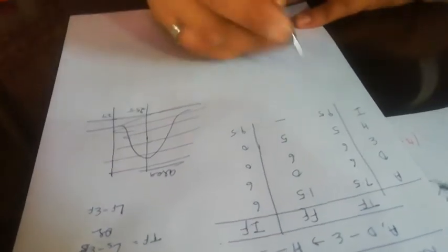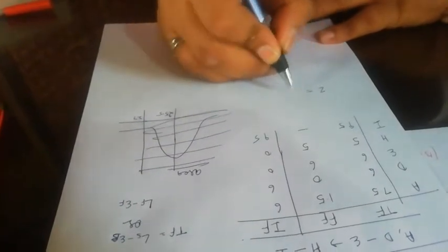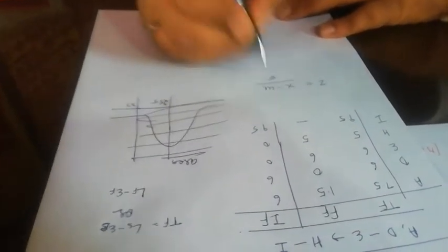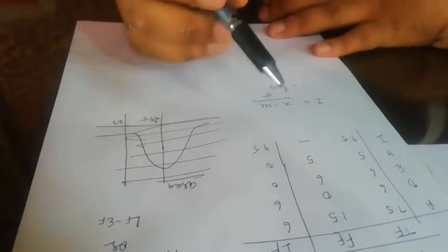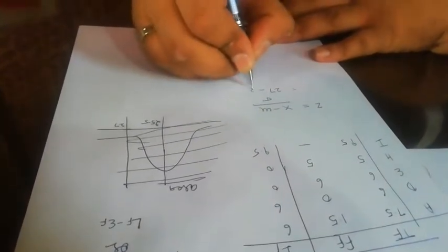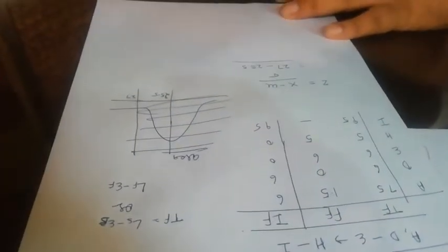So for this we apply the normal distribution formula, which is Z is equal to x minus mu divided by sigma, where x is the value we want to calculate for, 27, mu is our mean, which is 25.5, and then sigma. We are left with the sigma calculations now.